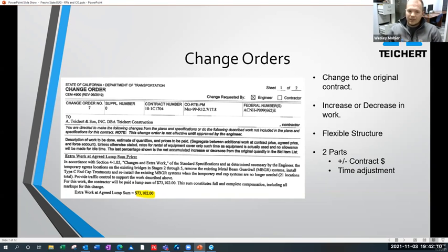That's T&M. Maybe a more traditional change order, which is ideal for most parties, is to do a lump sum or unit price change order that's agreed upon before you do the work. So that's a different kind that's separate from T&M. But let's say it's not something super critical that has to happen right now, and you have time to price it up. Like maybe they want to pave an extra driveway or something with concrete. Well, then you can price up that work and then send it in as a change order request, is what we call them, the COR.